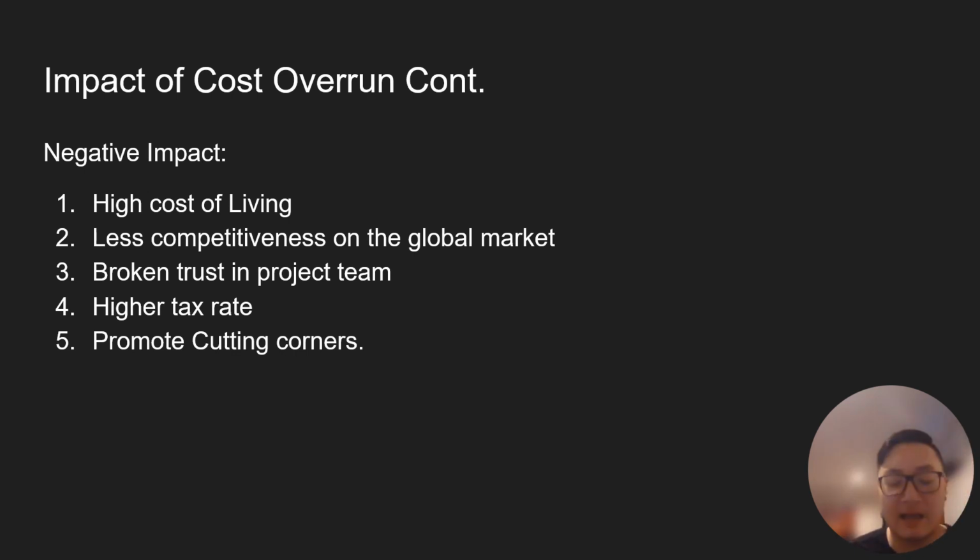When cost escalation happens, I will try my best to make my trade absorb that. And when I do that, they will try to cut corners to recover the cost on their end. They will try to get stuff done half the time, or send in, let's say, 2 workers to grind it out instead of 5 workers to get it done. That is a really big cost that people are not looking at, since your quality will go straight down because you want to recover more cost from your trade.